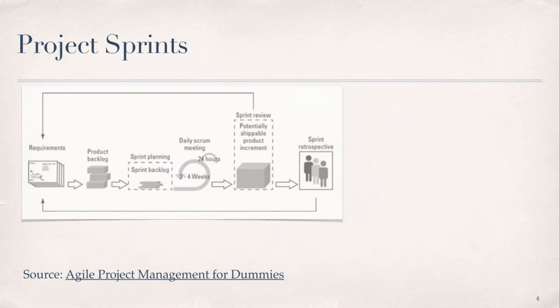Scrum sprints are used in Agile project management to model adaptive, iterative, and incremental design thinking. As we discussed in the presentations and assigned readings in the last module, sprints represent the work that is done in Agile project life cycles via the sprint events, which include sprint planning, daily scrum meetings, sprint review, and sprint retrospective. In addition, sprints facilitate management and administration of two key project artifacts, namely the product backlog and the sprint backlog.